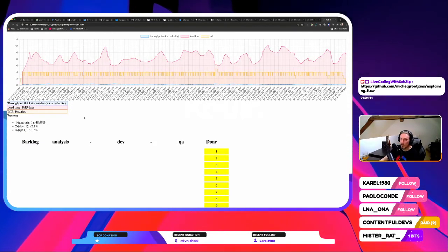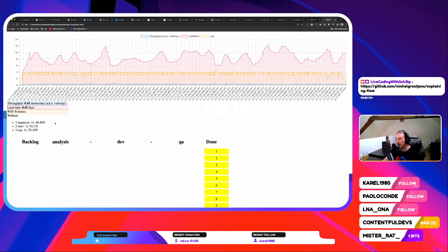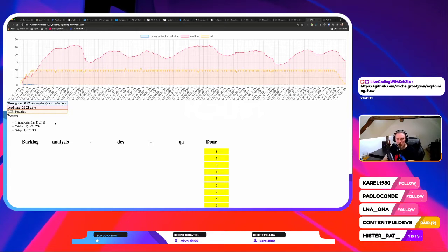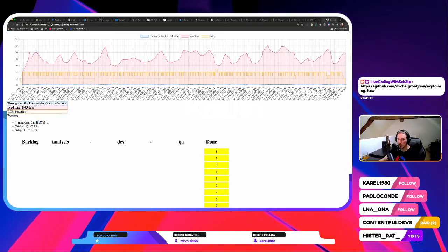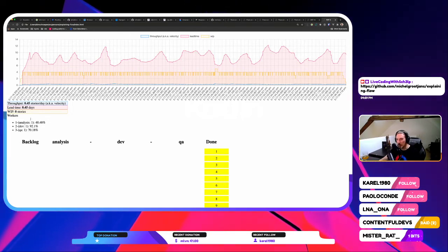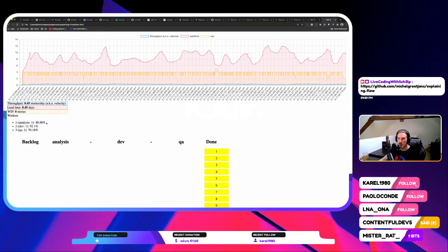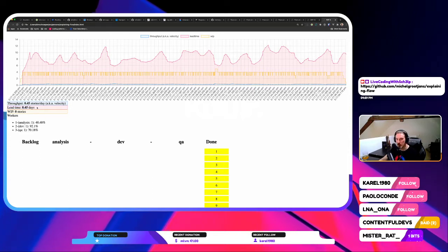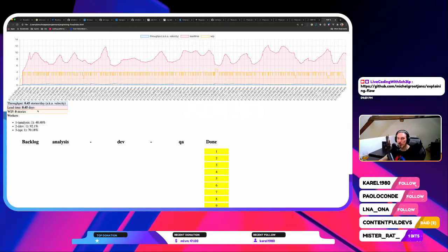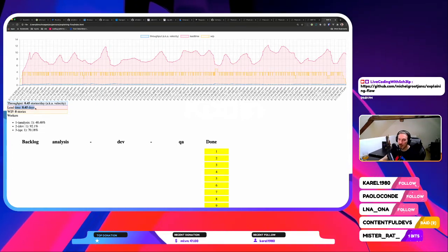The one thing we will notice here, though, is that the efficiency of an analyst is halved. They're only now working at 50% capacity, let's say. Typically, you could consider that a problem, but it's only a problem if you only evaluate how efficient a single person is. Of course, it's a silly thing to measure if the one thing you're interested in is how fast you can learn about the things you put into production. So even though these workers are not fully efficient, it shouldn't matter, because this is the one thing you should be measuring. This is the thing that provides you with more business value. Even though they're not as efficient, it is achieving the correct result.